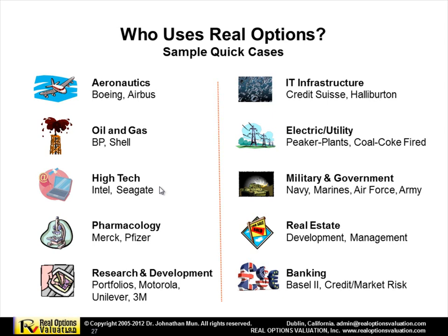All drugs that are developed have to go through, at least in the US and multiple countries around the world, a multi-stage process, phase 1, phase 2, phase 3, before going to FDA or Food and Drug Administration approval. So at least in the US, these are called stage gate sequential compound options, or sequential options, phases. You cannot go to phase 2 without first passing phase 1. So you cannot test on humans, biological tests, unless all your rats survive in phase 1.